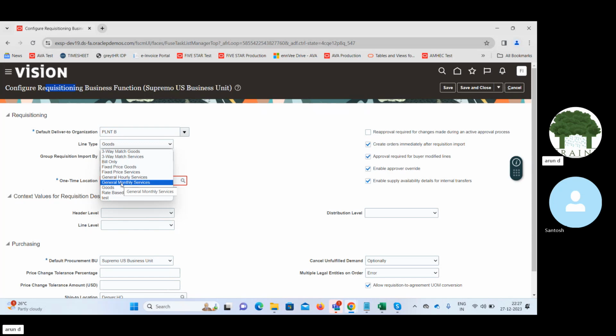So now this will have only the purchase order, which means an open and approved purchase order in the system. Using that, probably I'll create this amount for 12 months. I'll say for a month it is 10,000 rupees, and in the quantity I will say 12. 12 is the quantity that I'm going to select, and the unit of measure that I will be selecting here is monthly.